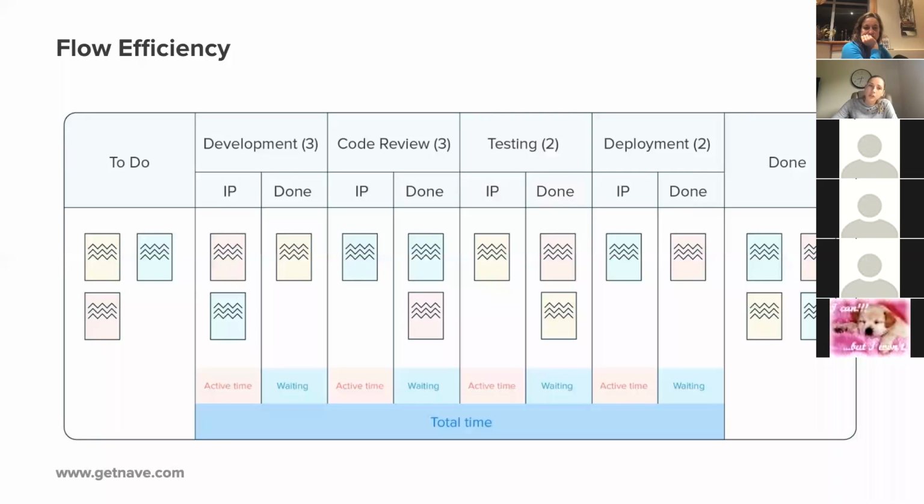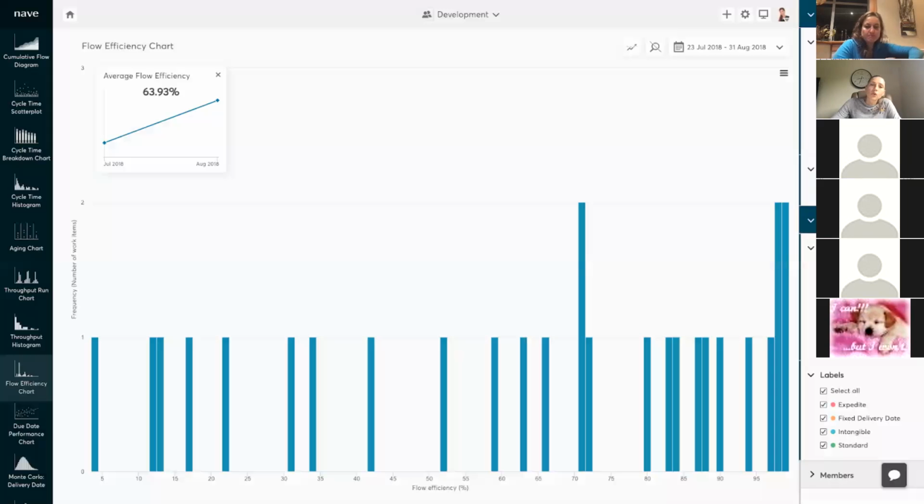To be able to measure your flow efficiency, you have to design your Kanban board to support that concept. Make sure you divide the states in your workflow into working states, where tasks are being worked on, and queue states, where tasks are held up waiting. Instead of pushing tasks into the process, teams pull work from the queue states once they finish what they've started. This is the foundation of a Kanban pull system. Using this approach, you will be able to measure the time spent in your queue states.